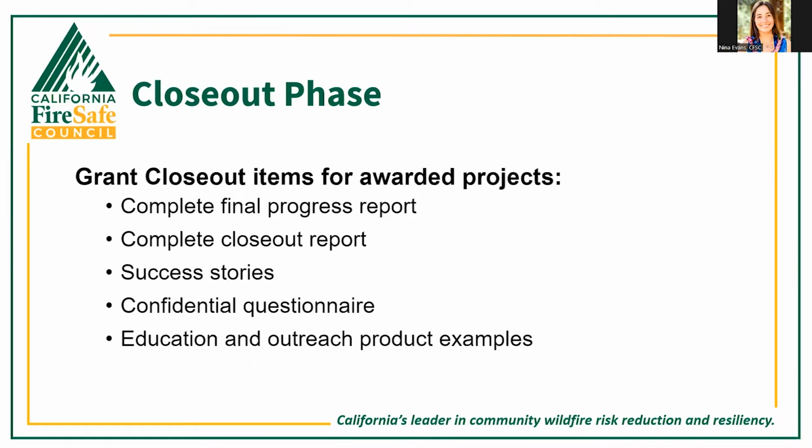And lastly, the closeout phase begins immediately following the grant term. All grants must be properly closed out with CFFC. And this process includes submitting a final progress report for your last quarter. In addition to this final progress report, a mandatory grant closeout report is also required, with an optional confidential questionnaire that you can submit. Any photos and success stories from your project that you've collected are also required for you to submit, and any examples of educational or outreach projects that you created using grant funds.